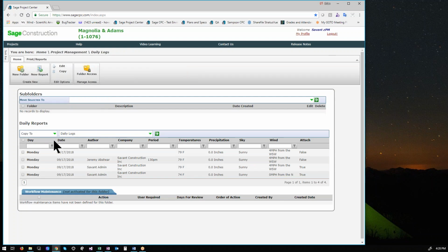So guys, the question was, do we need to upload photos daily? If there's an accident or something specific that needs to be documented, take a photo and upload it. Otherwise, just upload photos on Fridays of your weekly progress.